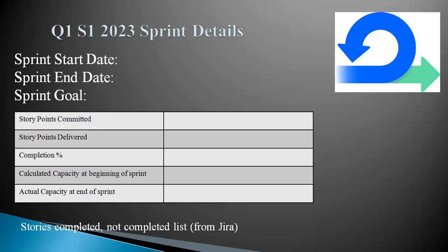So it is always recommended to keep track of that, so that you will be able to tell that at the beginning of the sprint, we had a good capacity of 80% from the team, but due to some unplanned leaves, we were having a very low capacity of around 65%. So due to this reduction in the overall capacity of the team, we were not able to meet the commitments. That means whatever story points you have completed, a few stories may have spilled over. So that can enable transparency and also help you to communicate to the stakeholders very effectively. That's the reason why I have included it in this way.